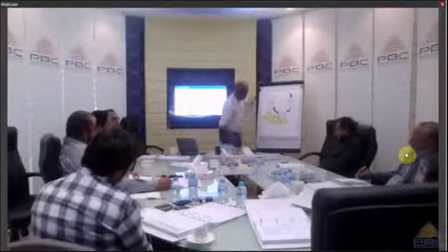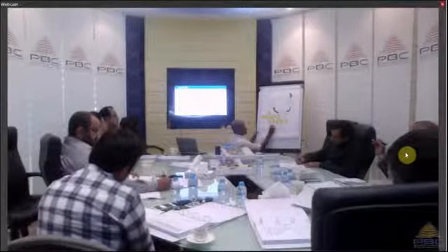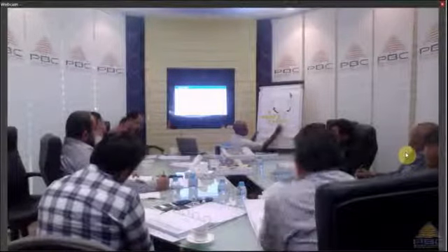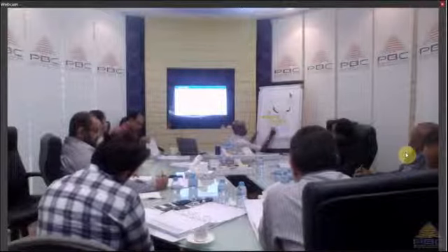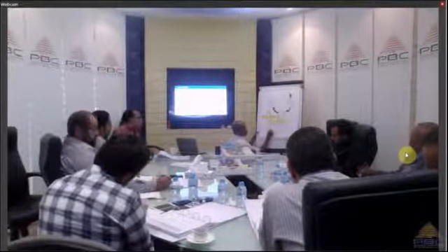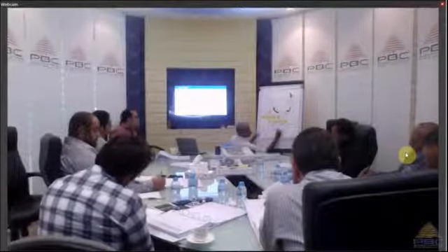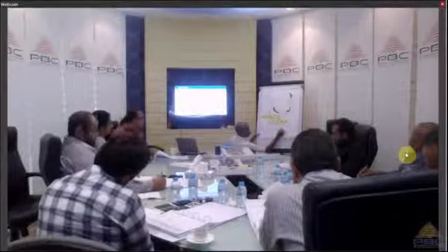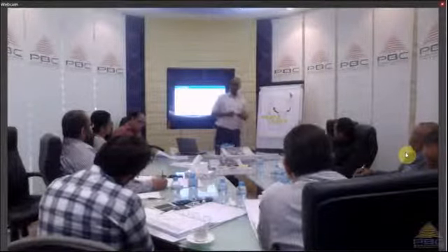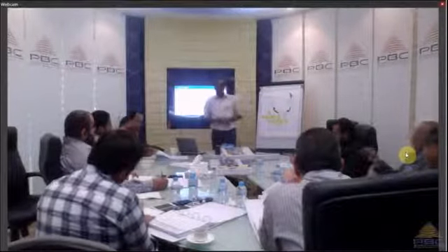I'm going to write it, okay? So criteria number one, when you can estimate the duration. Criteria two, when you can estimate the cost. Criteria three, when you can assign it to someone or a group of people to do it. Okay, so these are the criteria. When you reach these three, you stop breaking down further.